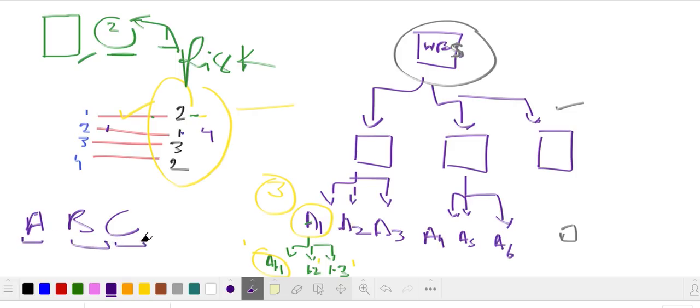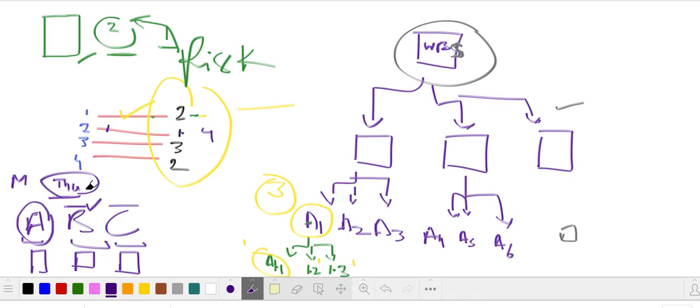suppose I have 3 walls and all 3 walls would have a purple color, well, there is a risk we are out of purple color, and I don't know when the purple color is going to come. Or suppose today is Monday, I know the purple color would come on Thursday, so there is a problem in doing activity 1. But we know on Thursday we're going to get it. So the risk right now is on B and C also because the purple is not here. But on Thursday, when we do have the purple color, the risk will be eliminated.